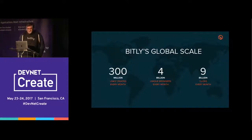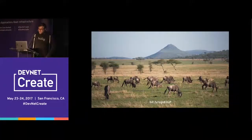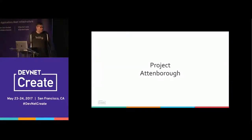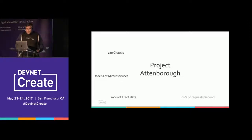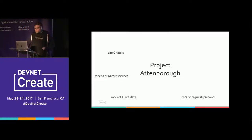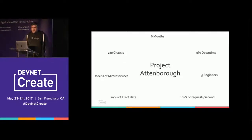So one of the things that made it interesting was doing a data center move — a great migration. For us, this was Project Attenborough, and it largely happened in 2015. In the course of this project, we moved about 220 chassis, dozens of live microservices, hundreds of terabytes of data, all while handling tens of thousands of requests per second in a live production environment. We did it all in about six months with five engineers and zero downtime.